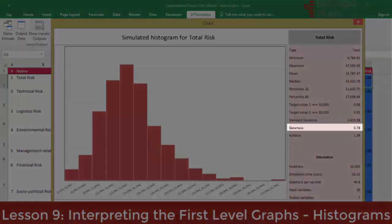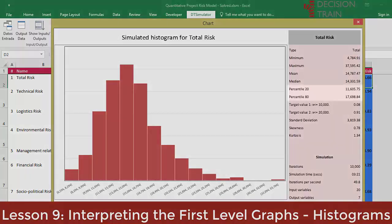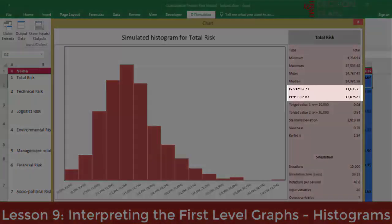There are low probabilities of very extreme values on the positive or right side of the curve. The fact that the asymmetry is positive at 0.78 and relatively high indicates this high degree of asymmetry in the curve. In fact, this is why it is possible to set lower and upper limits of percentiles and target values. At this time, the two set percentiles have been set up at 20 and 80.